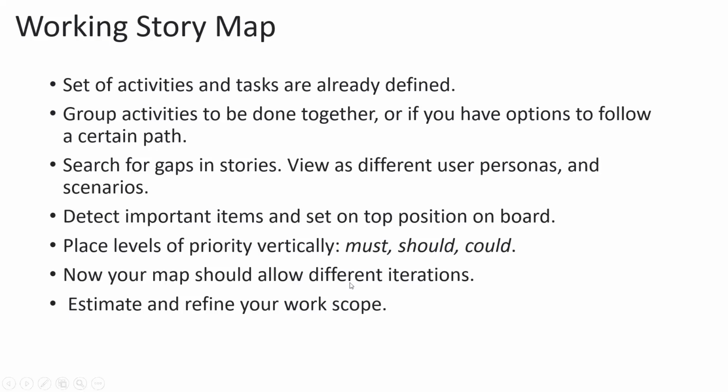And then one decision we map into different iterations, like different sprints. We try and map stories. We now have stories ready for at least the coming few sprints, right? Only when we have the stories will the sprint begin. And then as part of our sprint activity, we take those stories, we estimate them, we refine them, and we start our sprint, right?